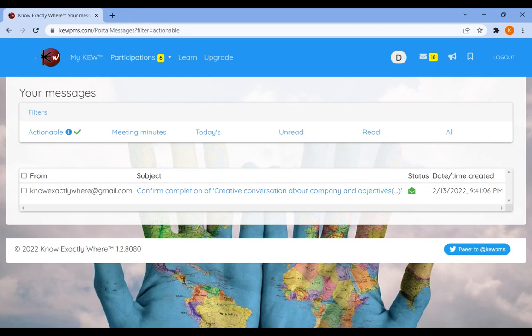And a different story is that I remind you that those tasks should finish. In this case, if it's not her fault, that's fine. But at the very least, you should know because you, as a participant, also have a responsibility to go back to the project manager and say, hey, I see these tasks are supposed to be done by tomorrow, but I don't see how I can start them because nothing has been launched that allows me to start them. So basically, the whole project is going to be driven by the tasks that complete and that trigger other tasks to start. But at the same time, the participants have the visibility on when things are supposed to be happening so that they can be aware and they can communicate back to the project manager.